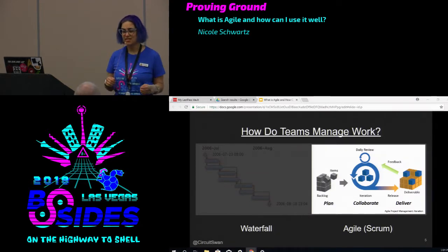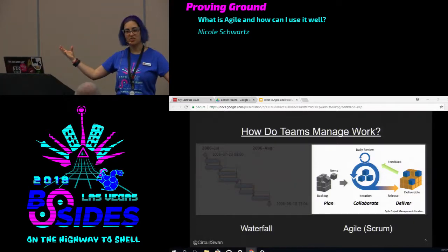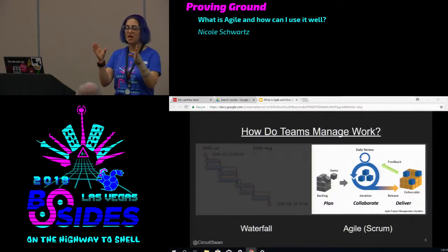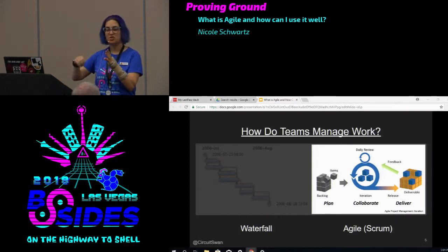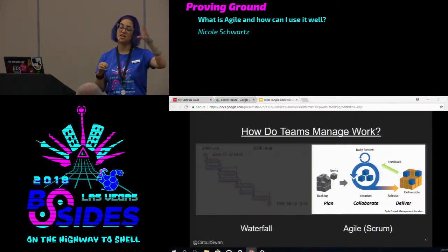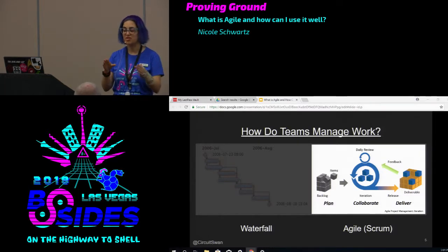Agile. In this case, I'm going to be talking specifically about Scrum. So Scrum does things in little tiny cycles that are 1 to 3 weeks long, and you're concentrating on 1, maybe 2 features. So instead of a whole package set of features, you're just getting that 1 or 2. You do the requirements, the dev, the testing for that whole thing. And so you start off with your kickoff meeting, get your stakeholders on, decide what you're doing, work on it, have daily check-ins, and at the end you present it to all of your stakeholders so everybody's on the same page and you get it out the door.